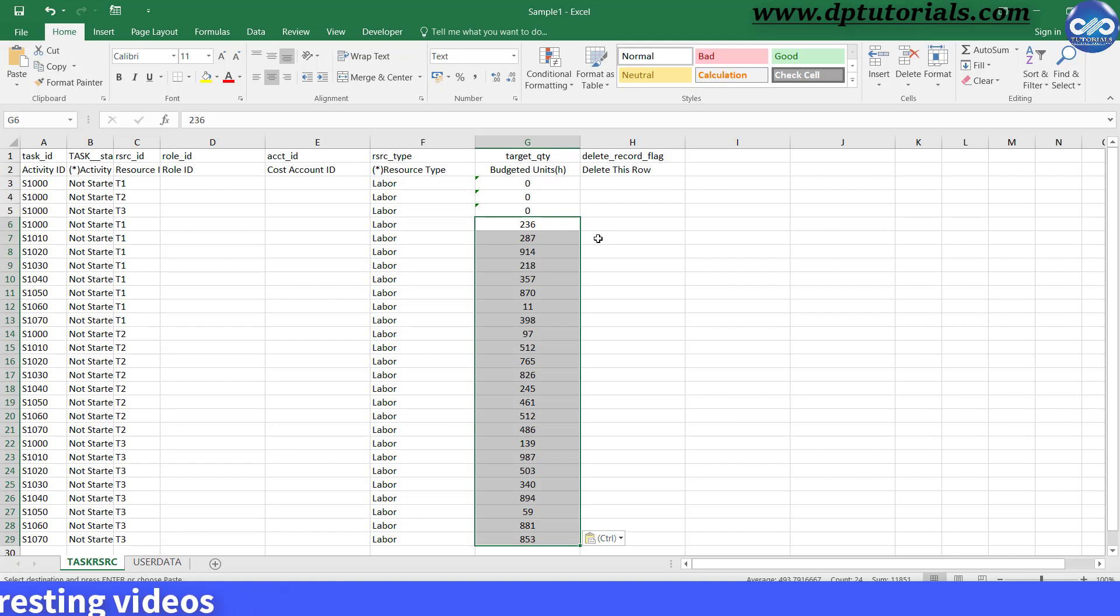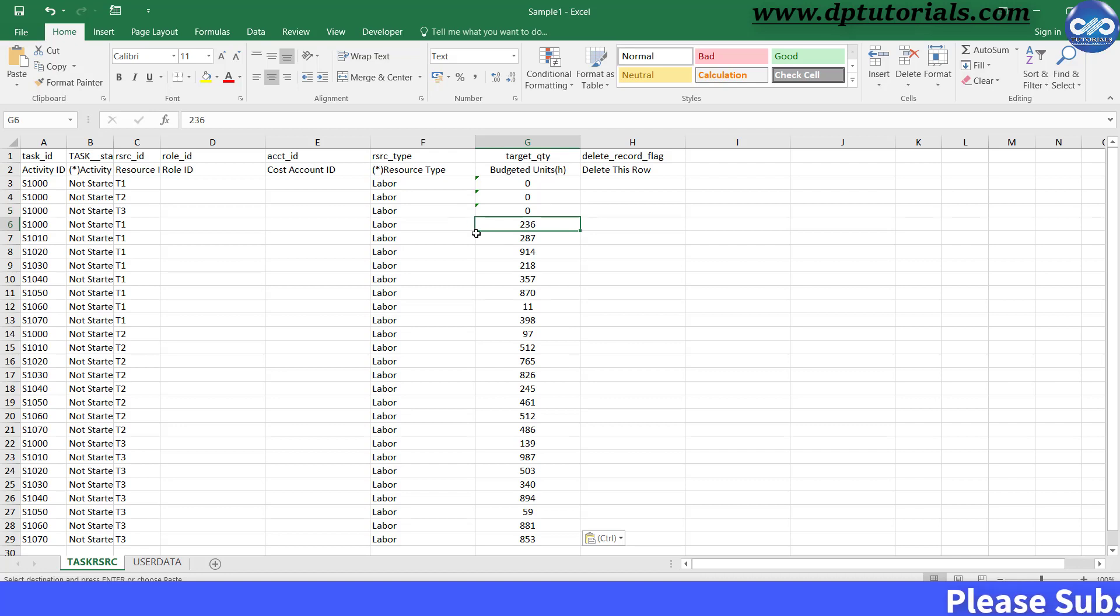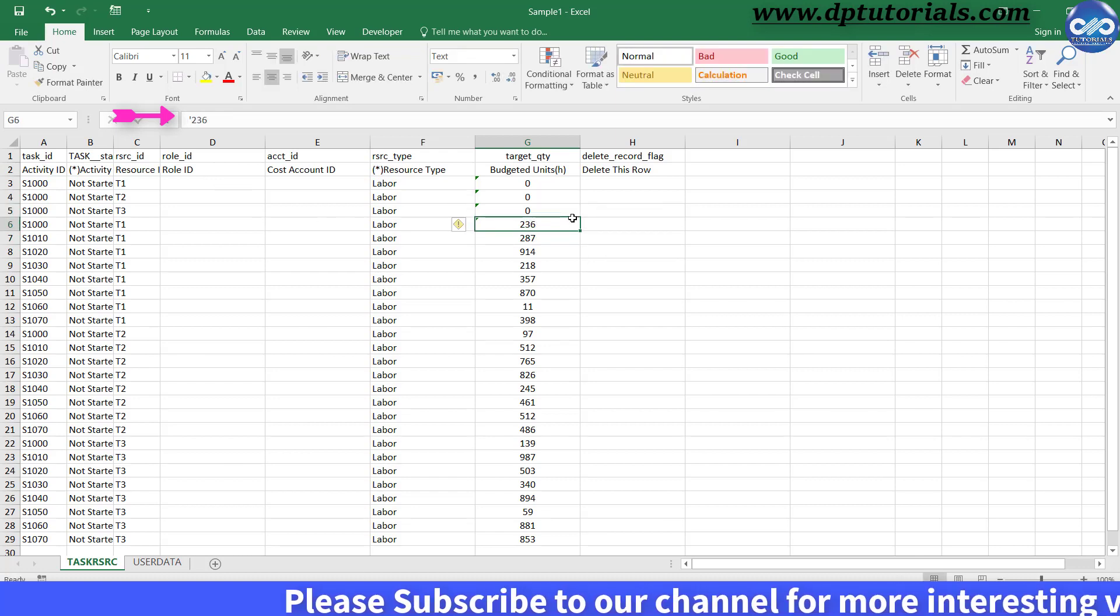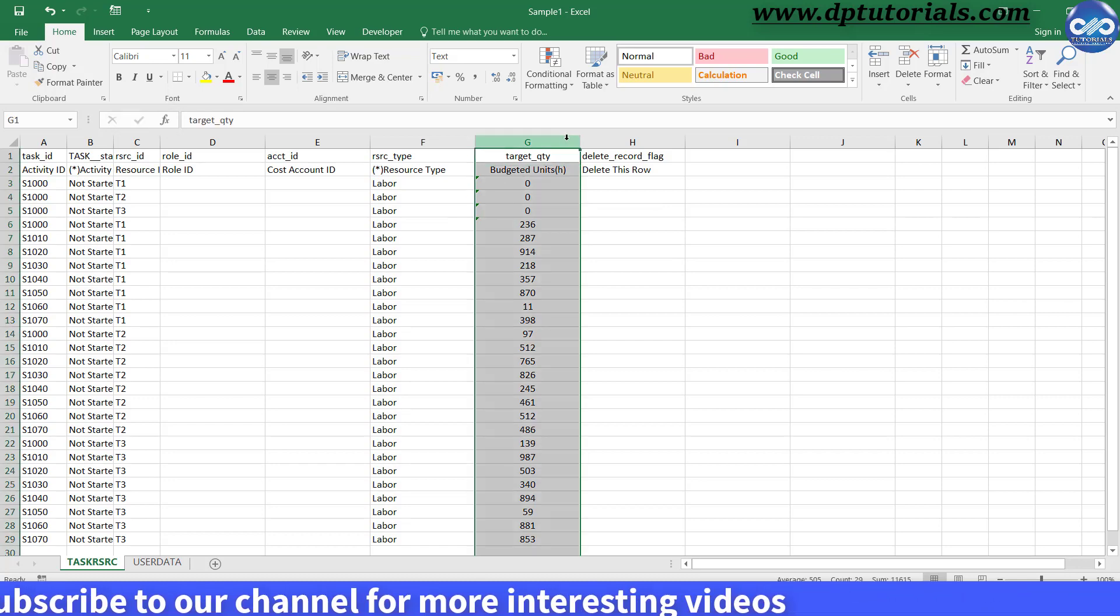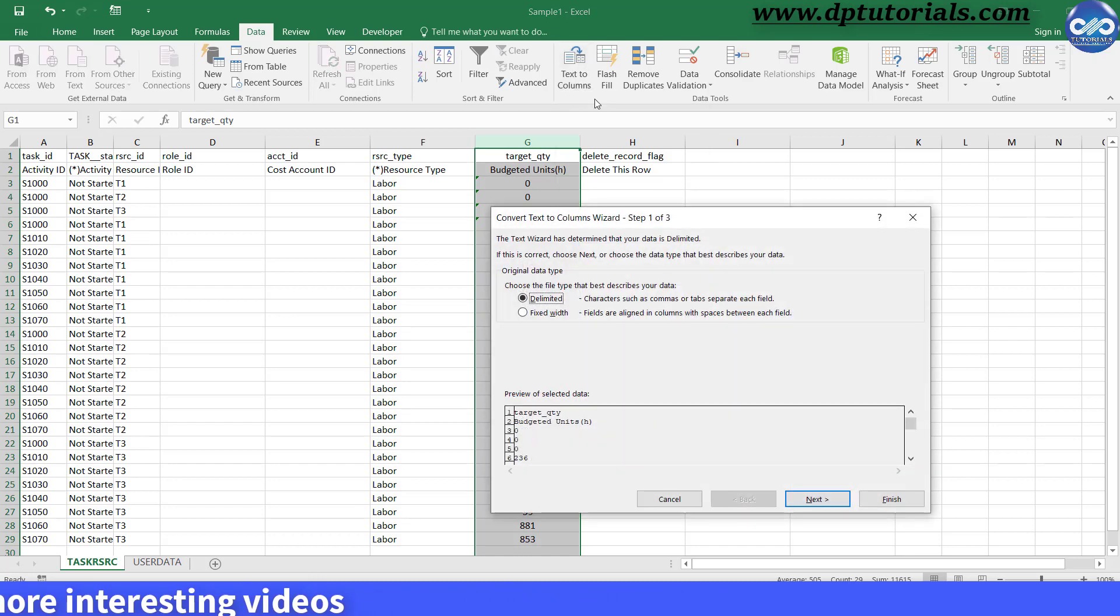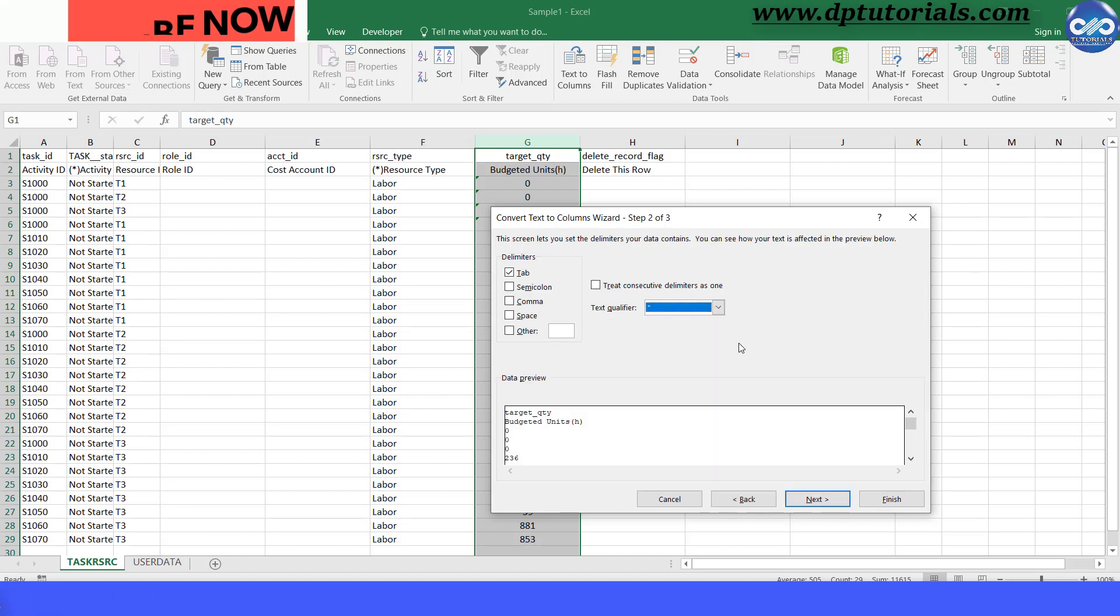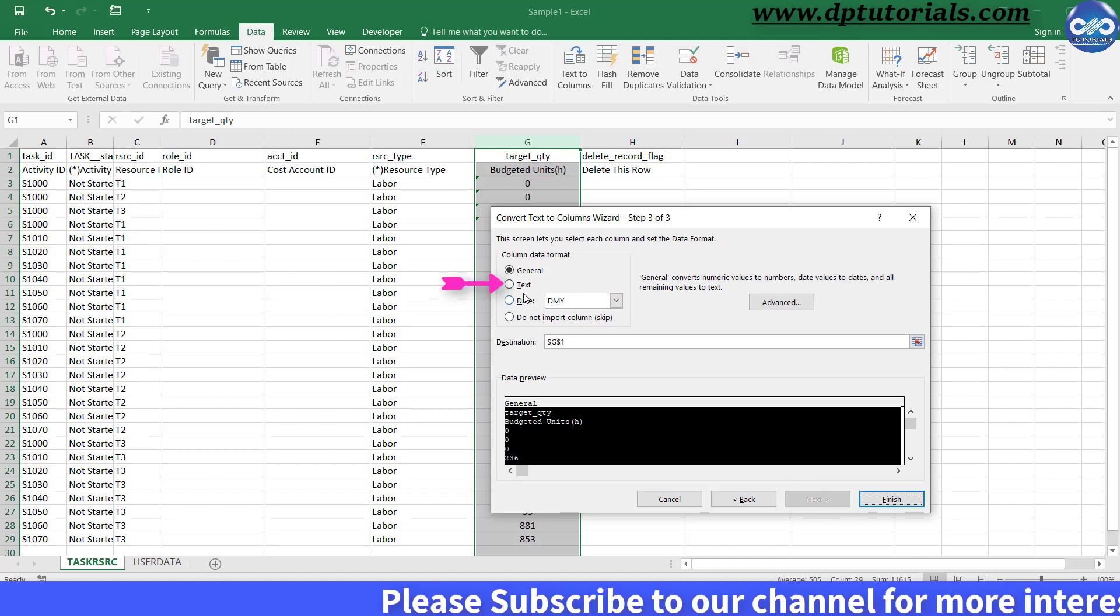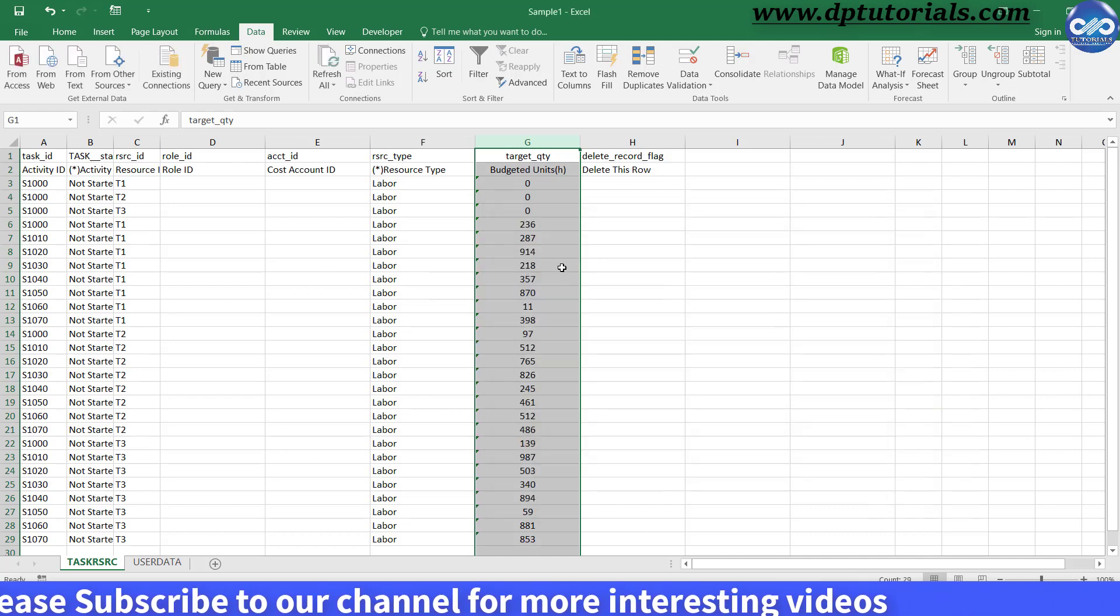Once you are done, as the final step, you need to convert the budget units into text format in Excel rather than number format before we import into Primavera P6. You can add an apostrophe mark before the number to convert as text. Or else, you can use the Text to Columns feature like this. Select the entire column G. Go to Data tab. Click on Text to Columns button. Select Delimited. Click on Next. Select Comma as the delimiter and text qualifier as apostrophe mark. Click Next. Here, select the column data format as Text and click on Finish.